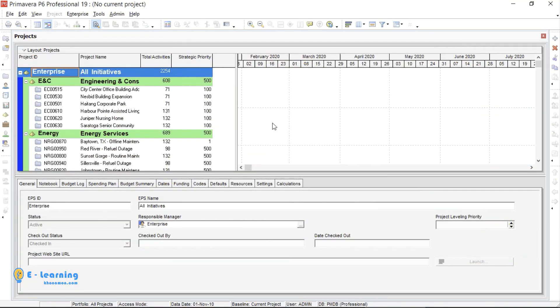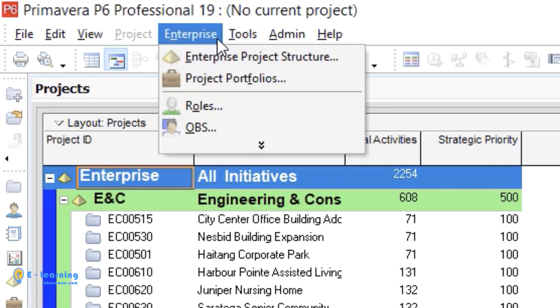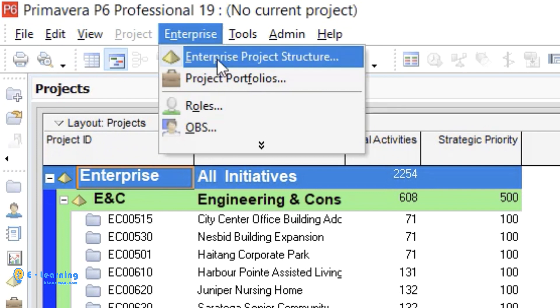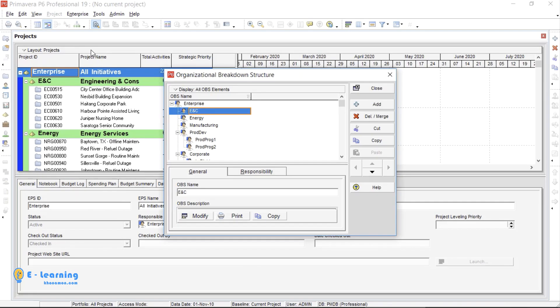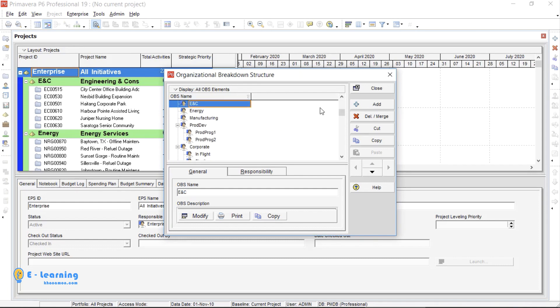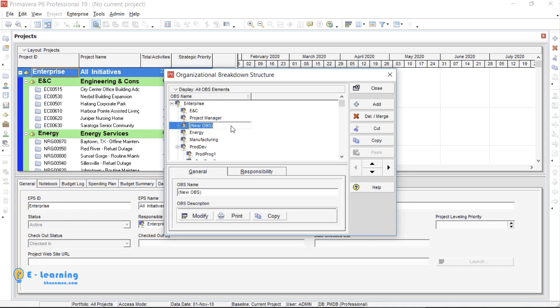For creating OBS in Primavera, go to Enterprise. From the drop-down menu, choose OBS. You see predefined OBSs. For creating a new OBS, go to Add. You can type the position of a person in the organization. For example, I want to add project manager as an OBS and also construction manager as a subset of project manager.